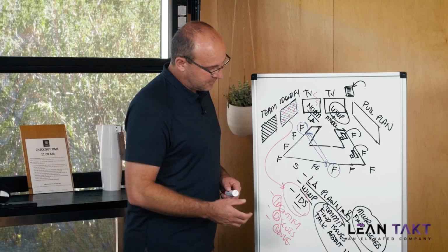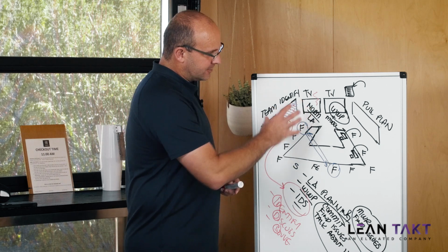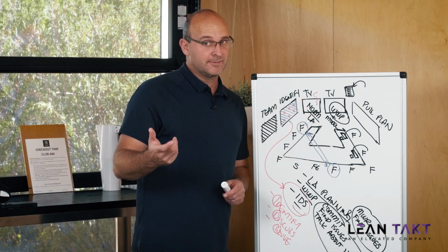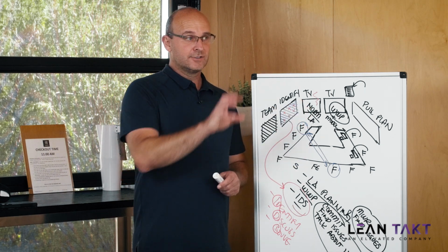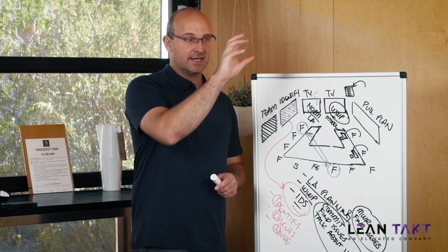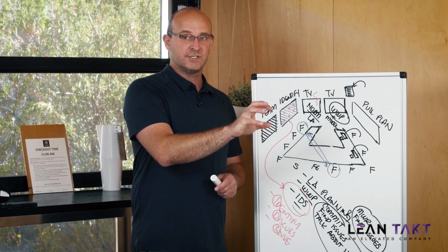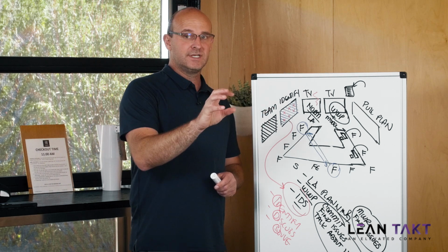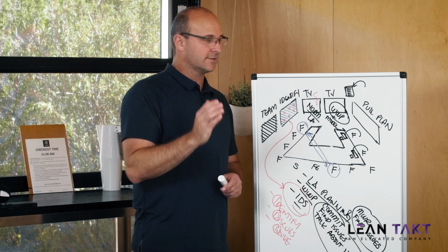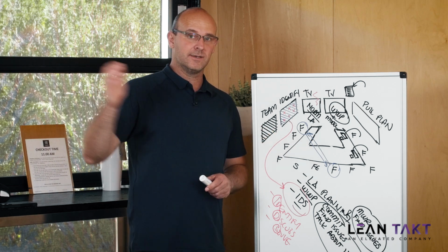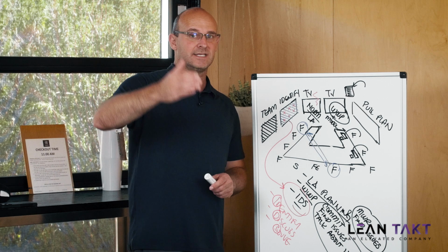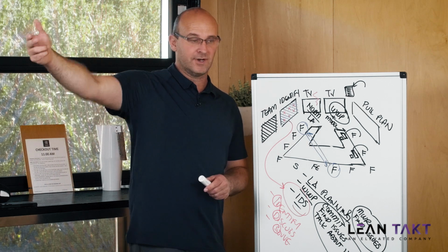So if you've done this properly, the trade partner weekly tactical, which I typically have on Tuesday. So Monday morning, the team weekly tactical. Monday afternoon, the strategic planning and procurement meeting. Tuesday afternoon is the trade partner weekly tactical. I can end up with a look ahead plan and a weekly work plan that takes me out to the next 2 Fridays.